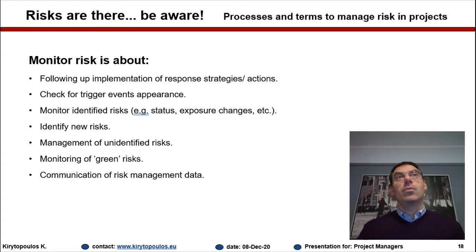As we said before, risk is a dynamic phenomenon. So the fact that you measure the risk at a point in your project doesn't mean that the risk is still at the same level. The probability might have changed, the impact might have changed depending on the phase of the project. Some risks have completely vanished because they're not timely anymore. They refer to a previous phase or anything else, so they're not there, and new risks might pop up. So this whole thing is a matter that we focus on when we are monitoring risks. And of course, communication is also a part of this process.